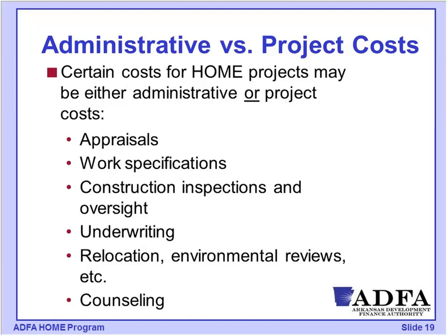I would also keep track of that and the address that it was related to so that those costs could be charged off directly to that project as opposed to coming out of our admin funding. And that is one of the ways to conserve that limited amount of admin that we have available to us.